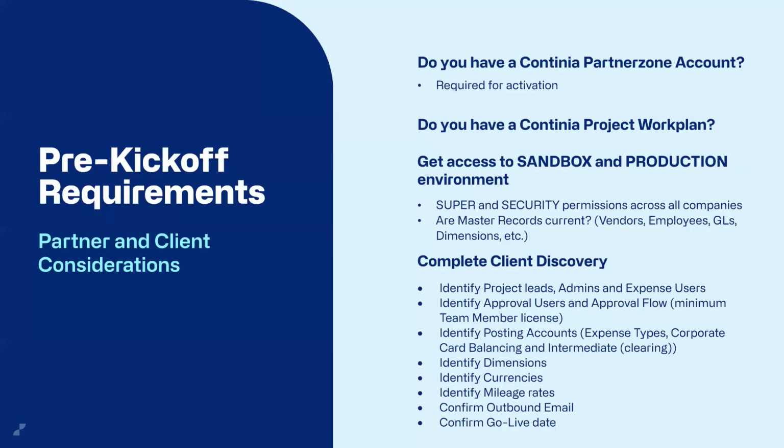We'll be doing mappings, obviously, to different accounts in the system. So in Sandbox, if you do a mapping to an account that doesn't exist in the production environment, then all the work you've done in Sandbox is for nothing, because we want to make sure that whatever you transfer from Sandbox to production is consistent between the two environments.